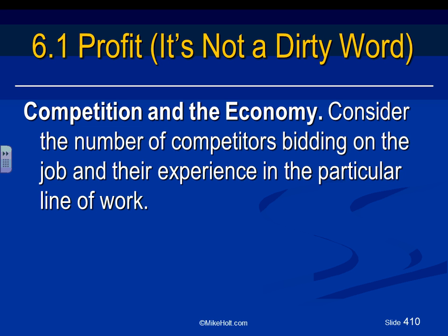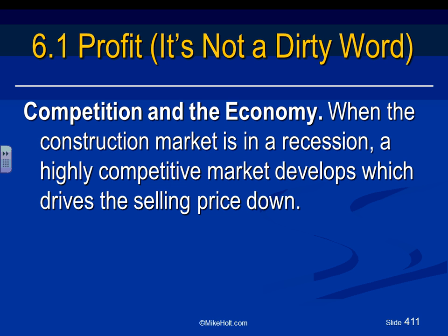Any comments, guys, about the competition and the economy? So that's what they're saying about that one. And the economy: when we're in a recession, guys, and there's a highly competitive market, obviously you can't ask for 10% profit. If you can get your 3 to 5% profit, you're good enough. So you're going to watch the economy. If the economy is hot, like supply and demand, guys, your profit goes up. If the economy is down, your profit is going to go down with it. Cool? Does it make sense or not? So that's straightforward, no gimmicks on that.